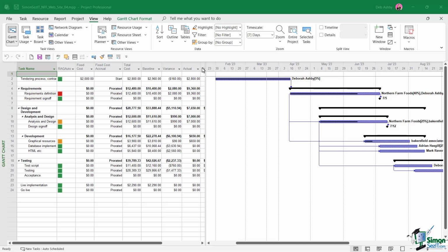So what we can do is we can set up the work resource for the consultant on the basis that there isn't an hourly charge or cost, but there is a fixed cost charge for their services. So we can set this consultant up on the basis that their standard rate is 0, but there is a cost per use. So let's take a look at that.